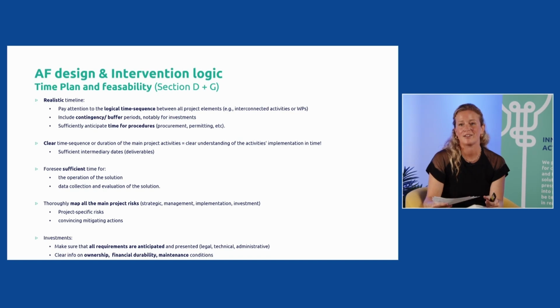Include as well contingency, especially for investment. You know that investment implementation can be risky, can be subject to delays, so do not hesitate to include buffer periods to make sure that you avoid major risk of delays during your implementation.